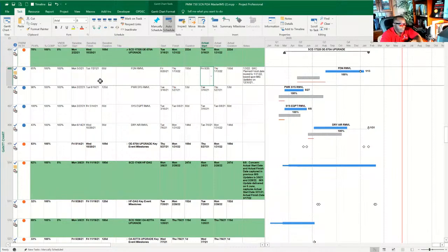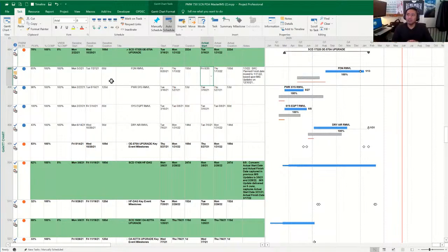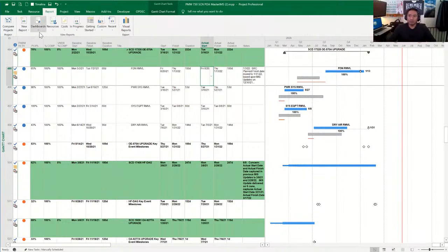Good stuff, Darrell. So let's say your typical project, when you have these weekly or quarterly or whatever the period is kind of meetings, are they looking to see something more summary level than this? Or are there other reports that they request? And what would some of those reports be? The main reports that stakeholders love to see is your plan versus actuals, meaning your remaining work and your cumulative work. So you could use the reports tab to your advantage by having a burn down chart.